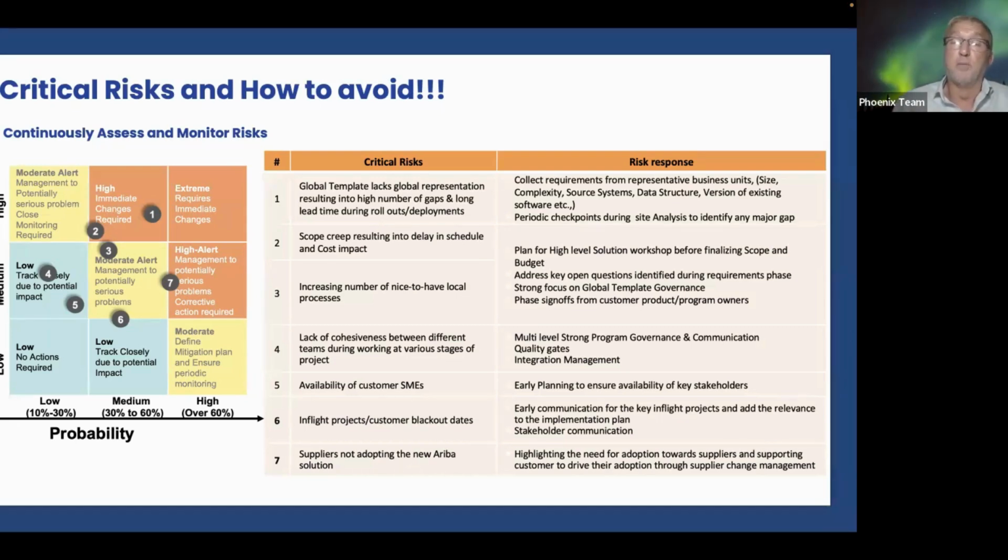So what we will do is we'll hear those issues. We'll delve into those issues. Are they real issues? Are they cosmetic? Or are they nice to haves? Or are they mandatory critical? And if they're critical, we'll address them. But if they're nice to haves, medium or lows, maybe we can do them in another phase.